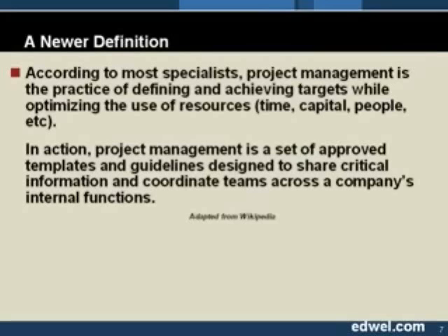If it's a small 1-week or 2-week initiative with just a couple people that you need to manage, using Microsoft Project and all its capabilities and features might be a little bit of an overkill. On the other hand, if it's a months-long initiative with dozens of individuals working on the project, then using that particular template might be a good idea. The templates are there to remind you to ask the questions. The guidelines are there to remind you that these are the questions that need to be asked.